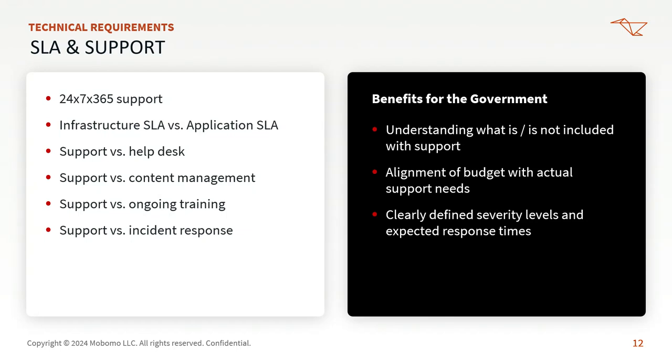is a need for your site, because if the entire development team is 3 or 4 people and you add 24/7 support as a requirement, it requires at least three people to fulfill that, right? To fulfill the 24/7. So you could be doubling the size of the team, doubling the price, the budget for it.